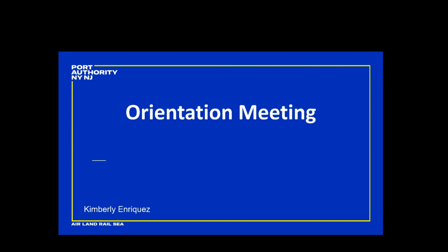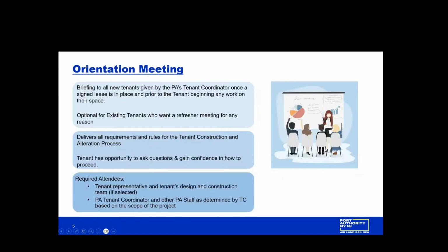So I'll start with the orientation meeting. At the orientation meeting, this is where the TCAP process will start. This is a briefing for all new tenants given by the Port Authority's tenant coordinator once a signed lease is in place and prior to the tenant beginning any work in their space. And this is also an option for any existing tenants who may want a refresher meeting for any reason.